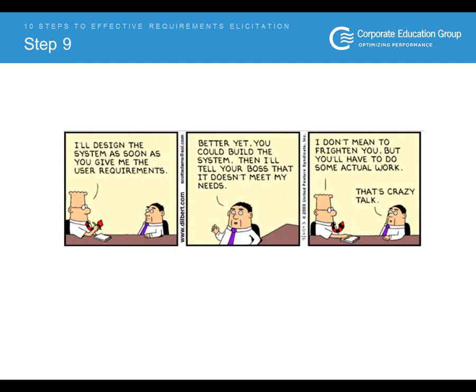I had a vice president of finance say 'we don't need requirements, let's just go out and buy the system.' They eventually conceded there were interfaces and other factors requiring requirements. They argued 'if I want a word processor I just buy Word, I don't do requirements' — and I said 'well, this is a little bigger than Word.' Even if it's a vendor package, it's important to invest the time in effectively documenting your requirements.